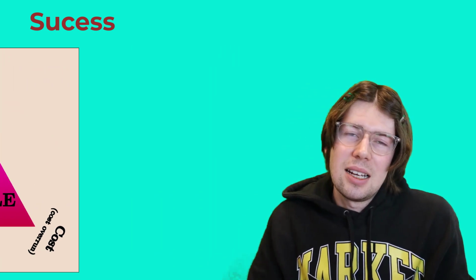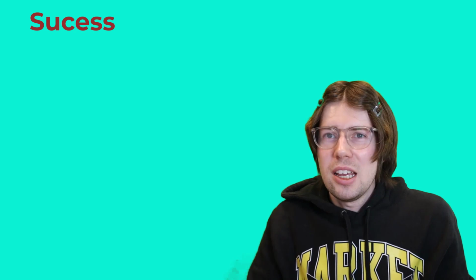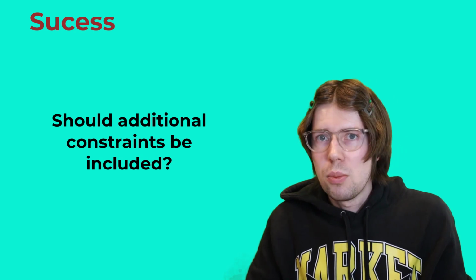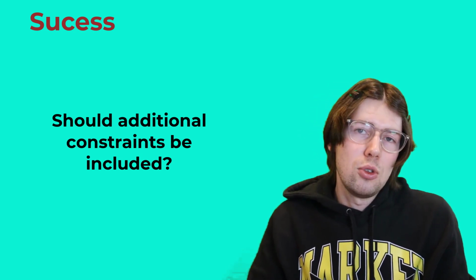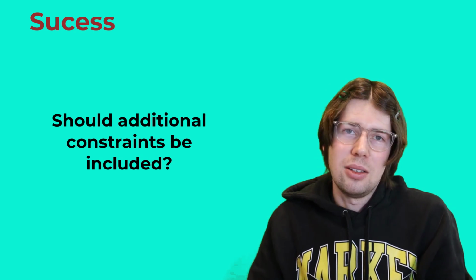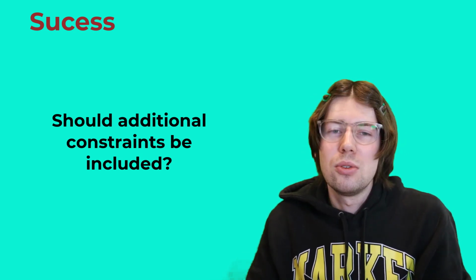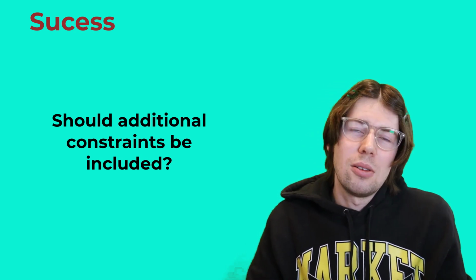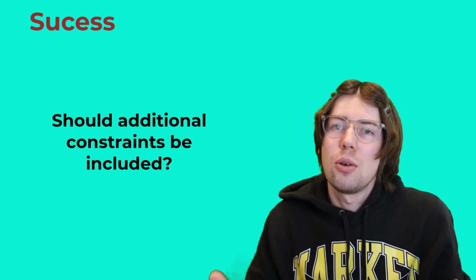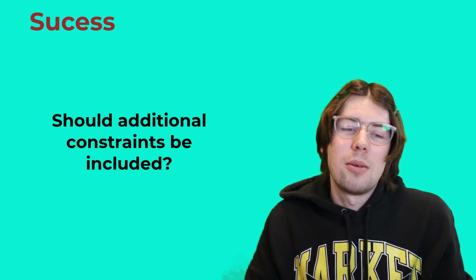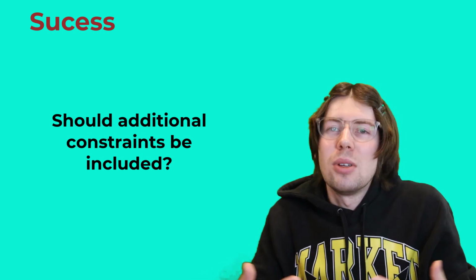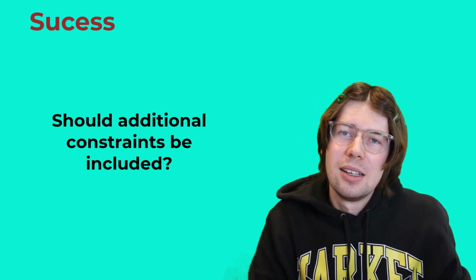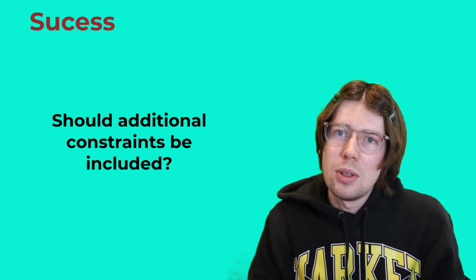Now, that being said, there's a lot of disagreement in the literature on whether we should have additional constraints. Why only time, cost, and scope? What if you just put an infinitely large budget? Then of course you will always be able to finish the project without any cost overruns. So maybe we should add additional constraints here, that we need to be cost competitive, that we are not building a wind farm any more expensively or planning to build it more expensively than some other company that's doing similar things. So cost competitiveness, that could be an additional constraint that we could add.